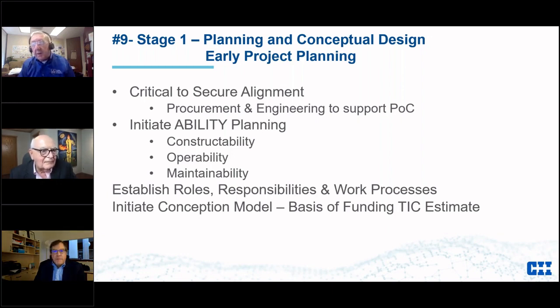And so then the other thing we're going to do, I call it the abilities planning. In the early stages there, you're going to look at constructability, you're going to look at operability, and you're going to look at maintainability. And all of those need to be explored. And we use a conceptual model at this stage to actually lay these things out and make sure that they're all right. You don't want to wait till you get into detailed design and find out you don't have the right constructability or operability sequences.